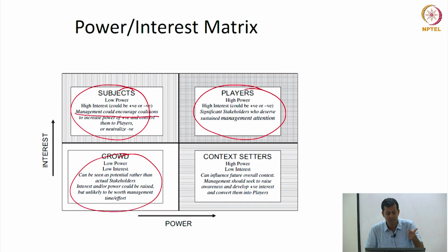So when we say interest in projects, remember that interest could be positive or negative. I might have an interest to make this project go forward. I might have an interest to stop this project, right? So interest could go both ways, right? If I'm a beneficiary, if I'm a commuter who could take this metro rail to work, then I have an interest that's positively inclined. If I have property whose value is going to increase, I'm sort of inclined. But on the other hand, if I am paying rent and living close to the metro, and I'm going to be disturbed by traffic diversions, noise during construction, if my rental is likely to go up as soon as the metro is finished, then I'm likely to actually have a negative interest in the project, right? So I've got positive and negative interests.